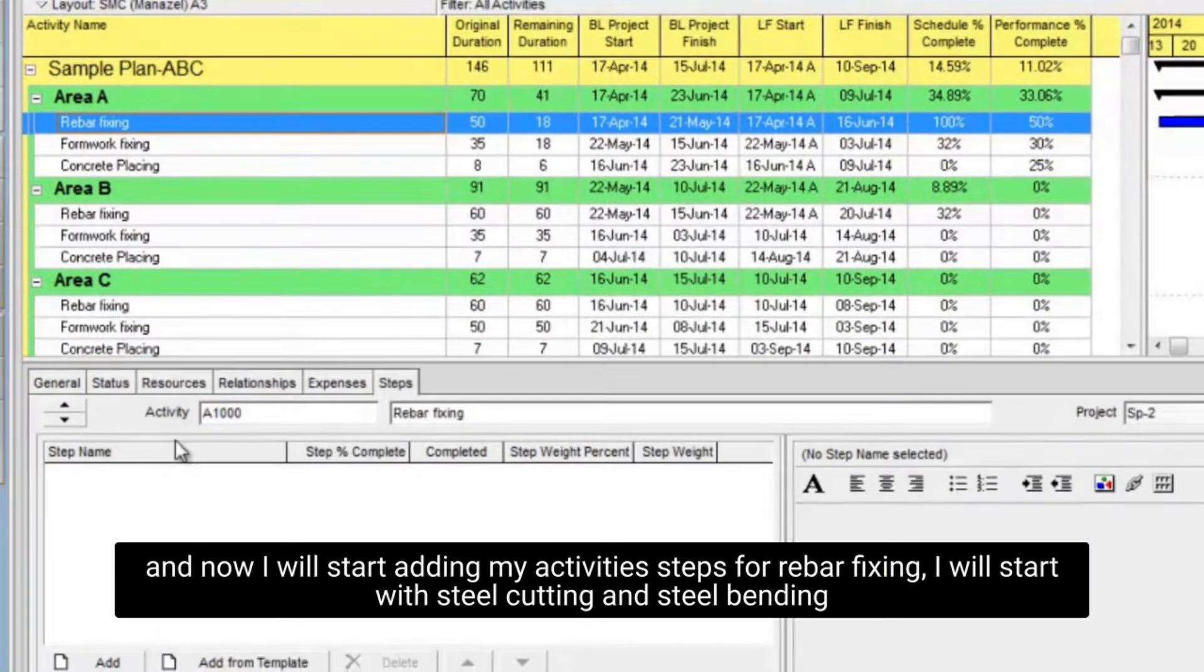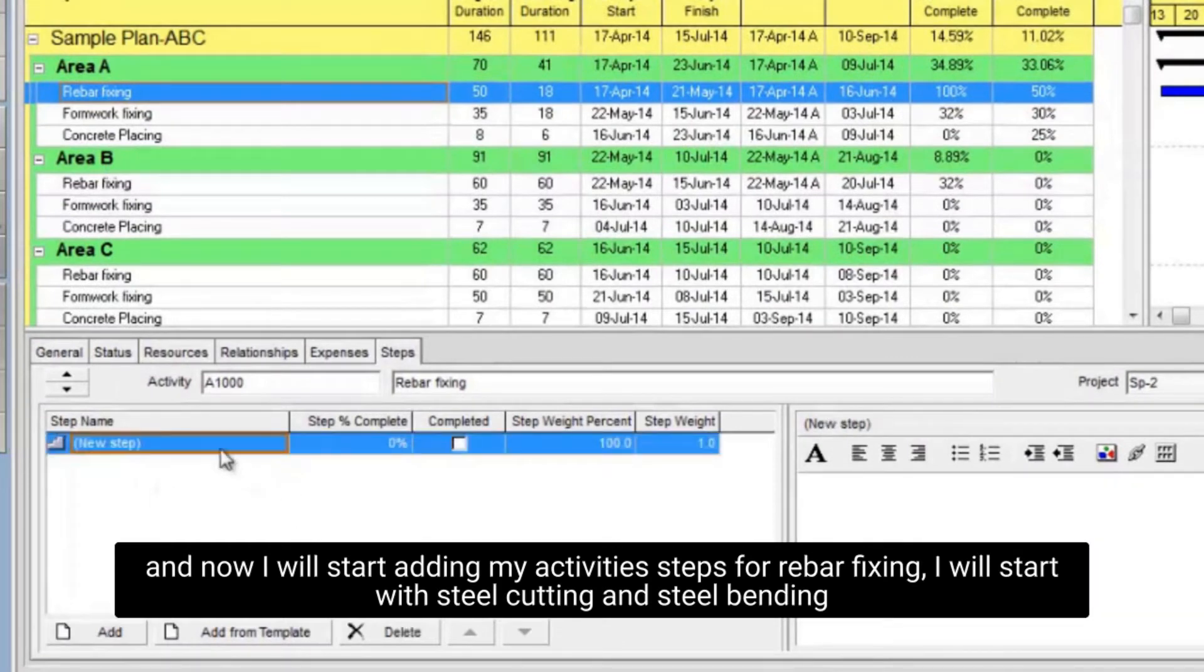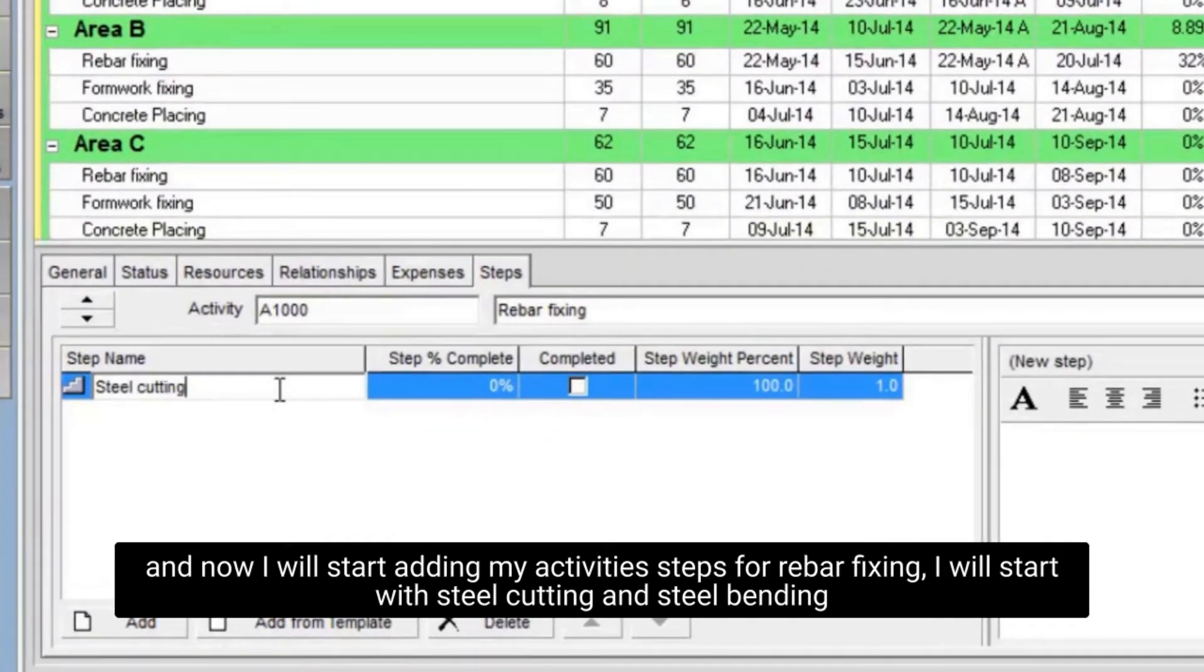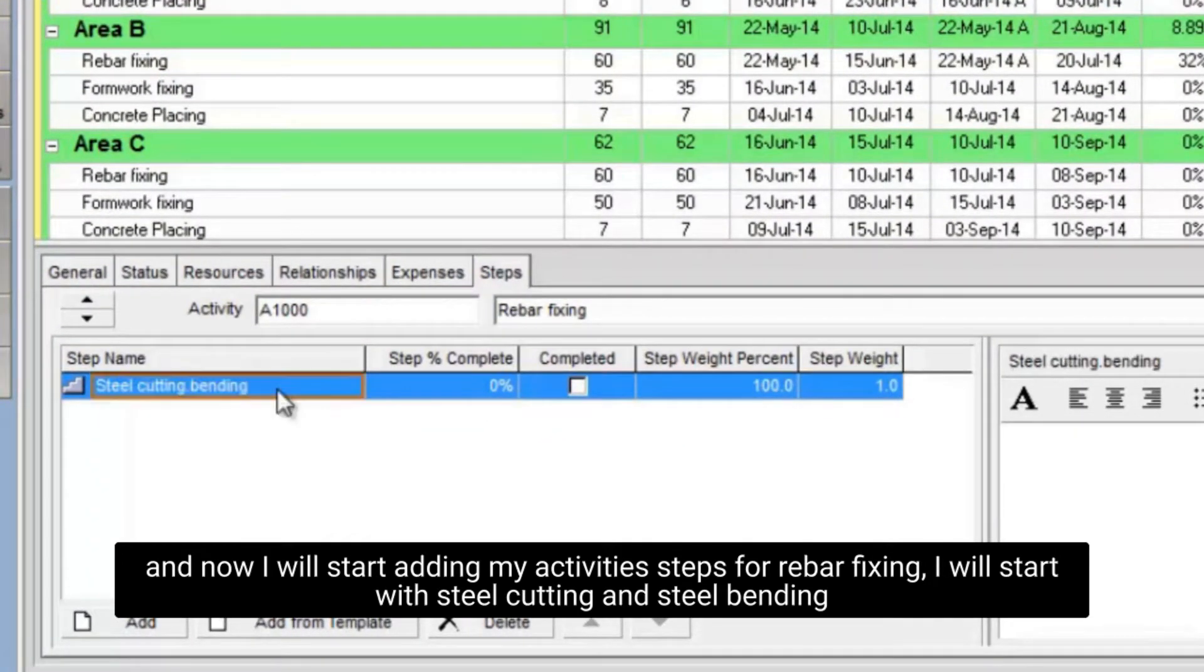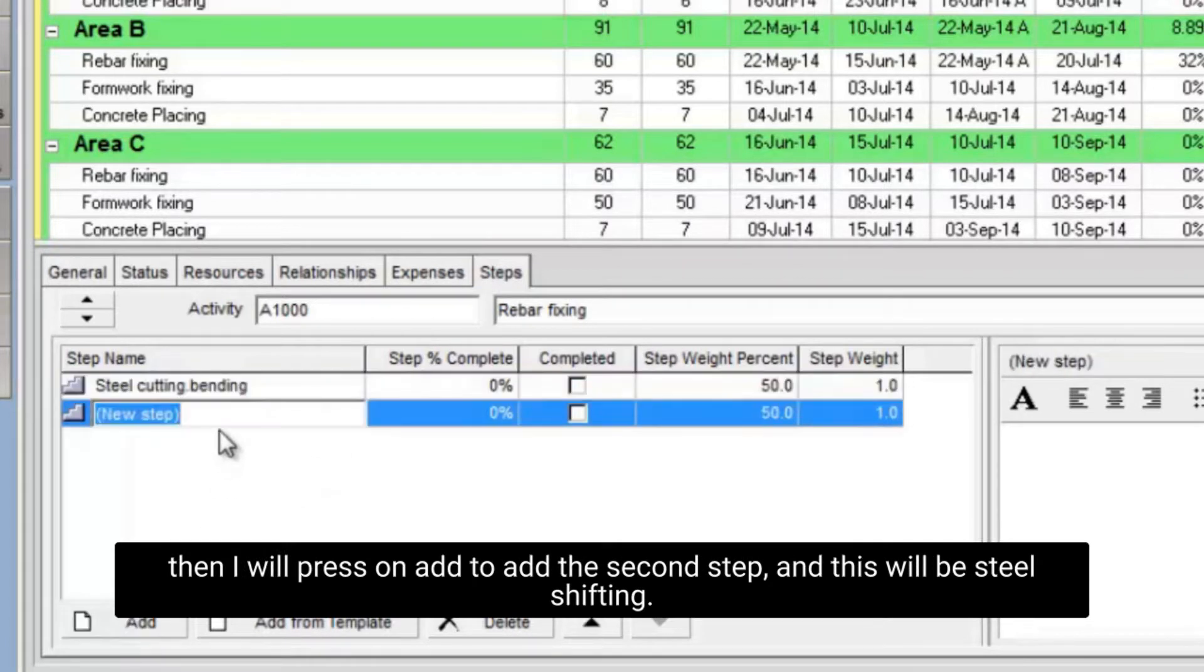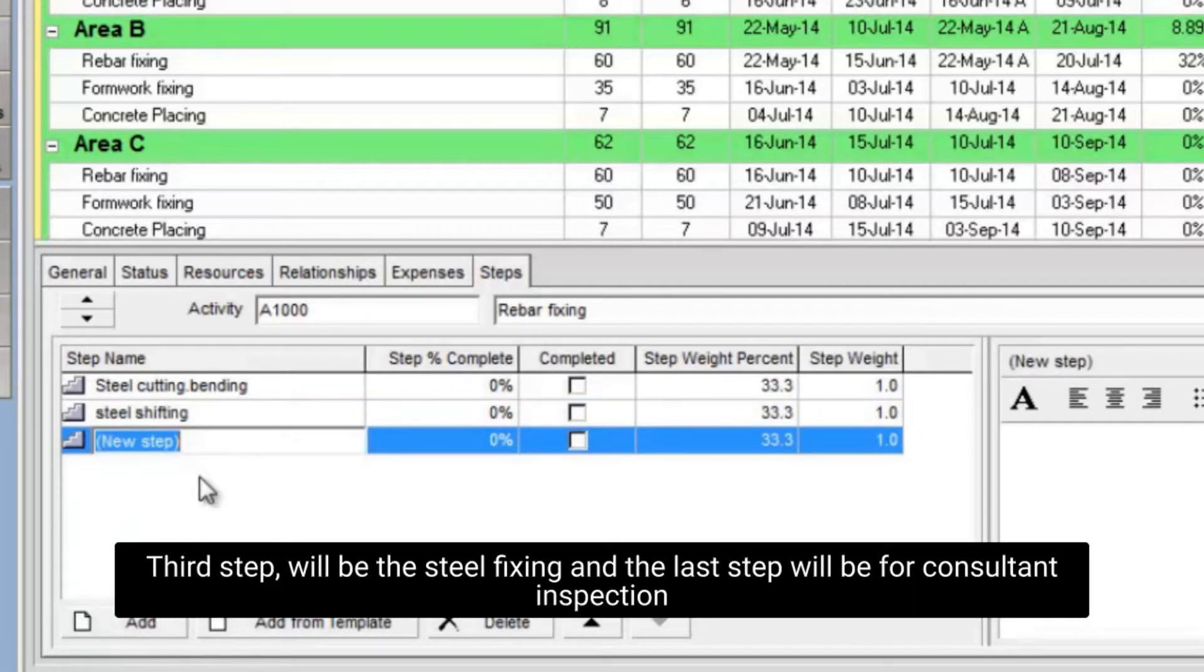And now I will start adding my activity steps for rebar fixing. I will start with steel cutting and steel bending. Then I will press on add to add the second step, and this will be steel shifting. Third step will be the steel fixing and the last step will be for consultant inspection.